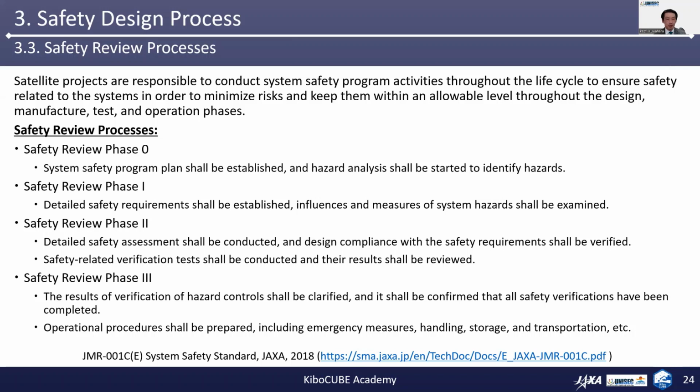In phase 2, a detailed safety assessment shall be conducted and design compliance with the safety requirements shall be verified. Additionally, safety-related verification tests shall be conducted and the results shall be reviewed.